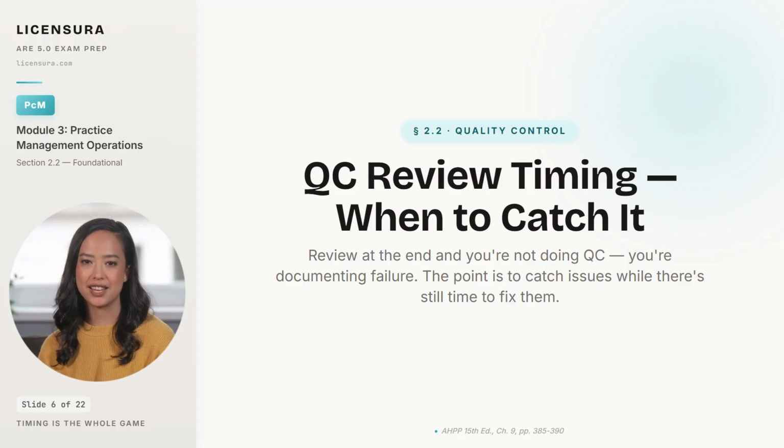Most architects say their firm does quality control. Far fewer firms do it at the right time. You see the difference at construction, when a clash that should have been caught at 50% CD becomes a change order that bills the owner 6 figures and exposes the firm to a lawsuit.